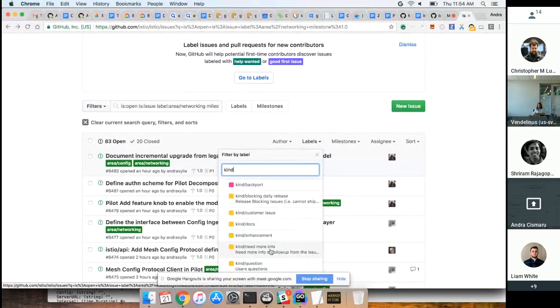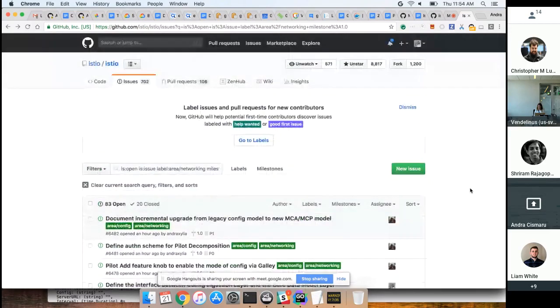If you think there is not a reasonable chance to work on it, at least unassign yourself and add the community help needed label, so that whenever we go through the issues, we can see what doesn't have an owner. There's always a background process for triaging unassigned issues. What I would suggest everybody do is go through all the issues currently targeted for the 1.0 milestone that are P0 or P1. You don't have to go any further than that. If you get past your P1s, I would be amazed.